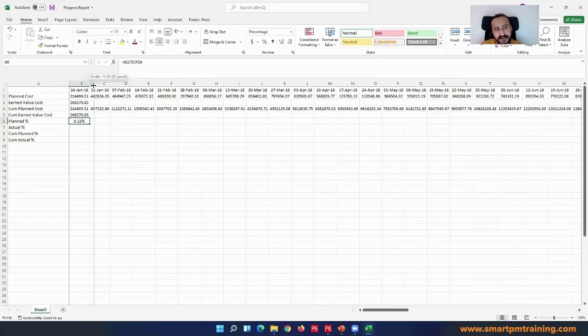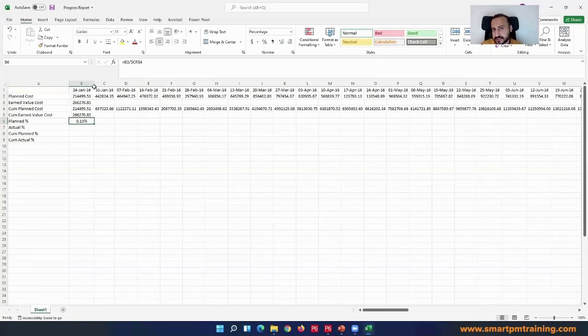Imagine we don't have cost or labor assigned in the schedule, and you want to get this information, like how much I should have achieved percentage-wise. I want a weighting system because I cannot use the number of activities as a weighting system. I cannot also use the duration as a weighting system. We talked about it before. We need a reliable weighting system we can refer to.